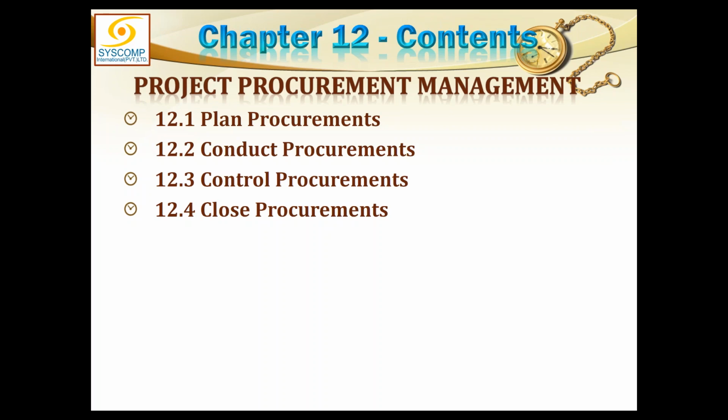Let us suppose it takes about 3 months to give the contract to a subcontractor. So 3 months before 15th of July, you must advertise in the newspaper and then follow the schedule of selection accordingly.